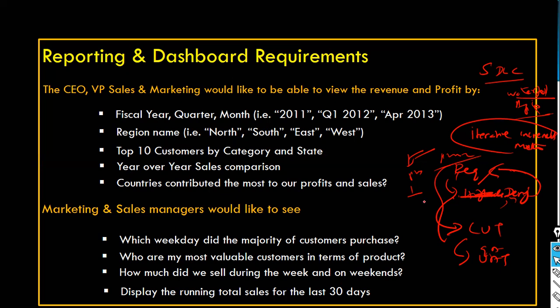These are the lessons, apart from the data quality issues. Whatever lessons you learned in phase one, you implement in phase two. Right before they start phase two, they make sure all the sponsors are available, and SPOCs, single points of contact for each application or system. Thereby we reduced the sign-off time. The data governance team also set up data quality. And we are able to follow the lessons we learned from phase one in phase two.